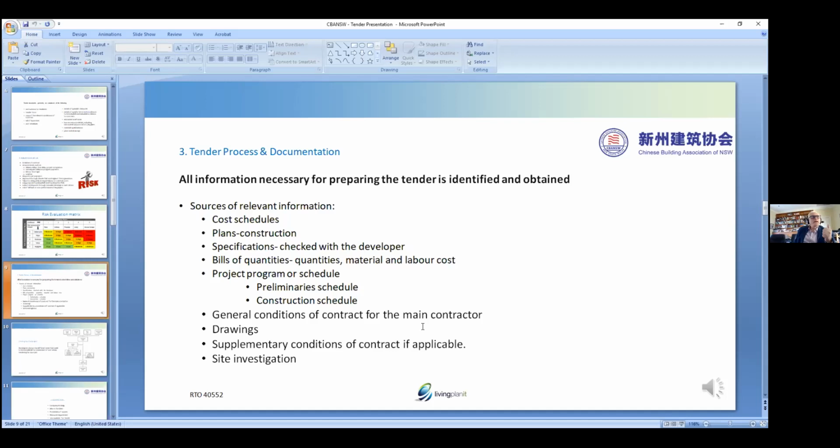Well, it's going to give me a lot of information. It's going to give me information about site accessibility. Is it a very narrow street? Maybe I'm going to have difficulty getting trucks to go in there. Big problem, right? Because your costs now for delivering of materials are going to increase. You've got to factor in these costs.